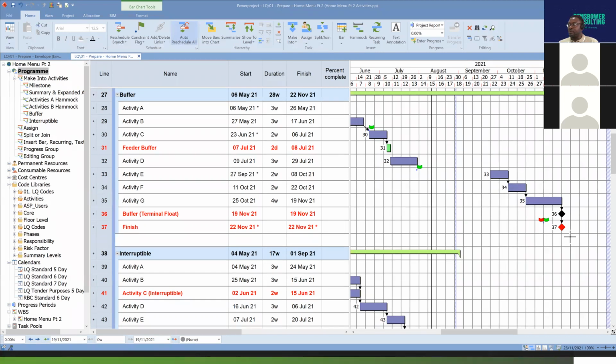And again, thank you, Harry, for that question, because that is very spot on. So now you have 0 days there. Any delays after the consumption of your buffer will directly impact your project finish date.